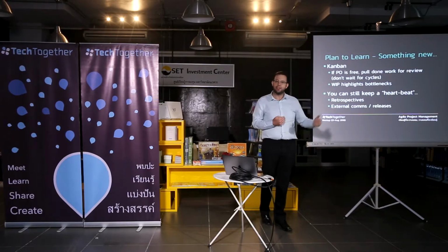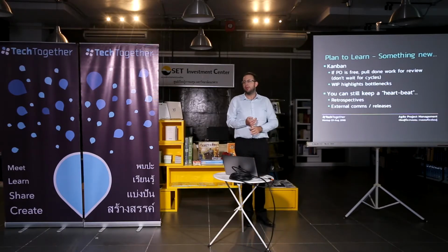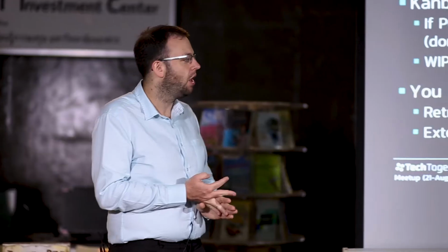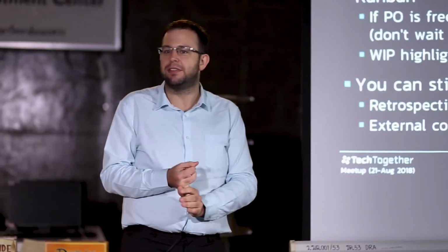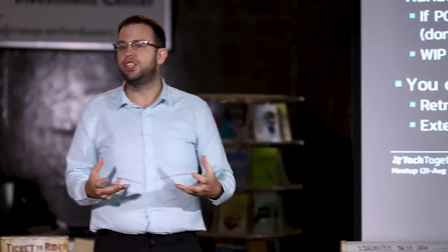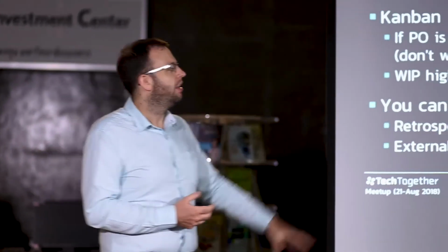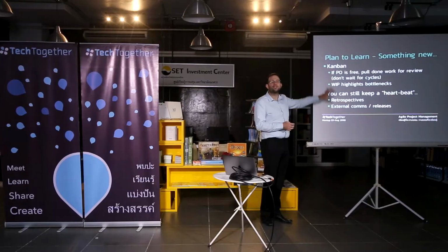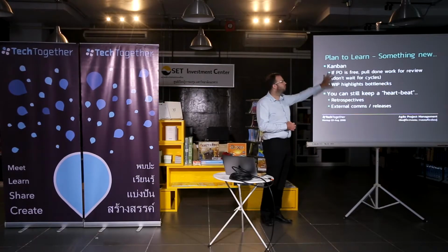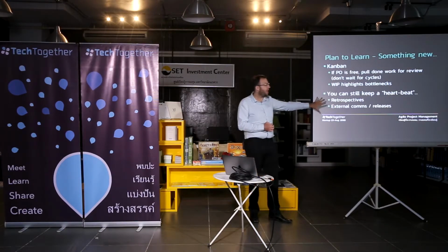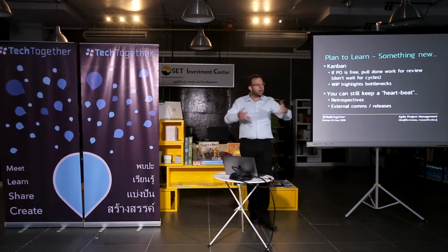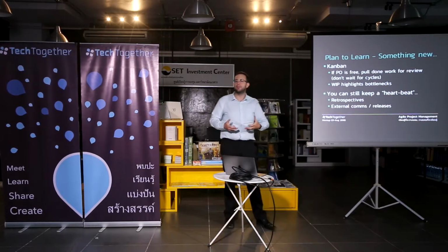As well as this, you can still keep the heartbeat of your project. You can keep your cycle if you want that, maybe for communicating with management or your retrospectives, or maybe you want to do a presentation every 2 weeks. That's not exclusive. You can do both. You could work in a very continuous way internally and externally pile up a basket full of delivered features and then present them together.